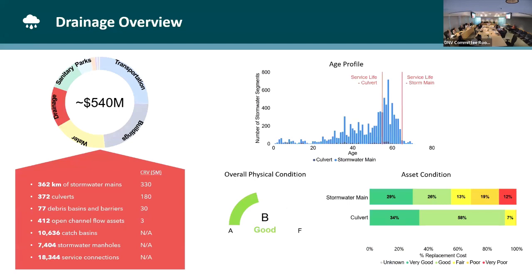I have some additional comments from Mr. Milburn. I just wanted to add to the conversation that the usefulness of having this level of understanding and data is that we can now think about the interrelationship of replacement of infrastructure. Whenever you replace underground infrastructure, you do a cut, and you're cutting into asphalt. So the more we can do to plan for co-aligning water, sanitary, storm, and streets, the more efficient we can be with the taxpayers' dollars.